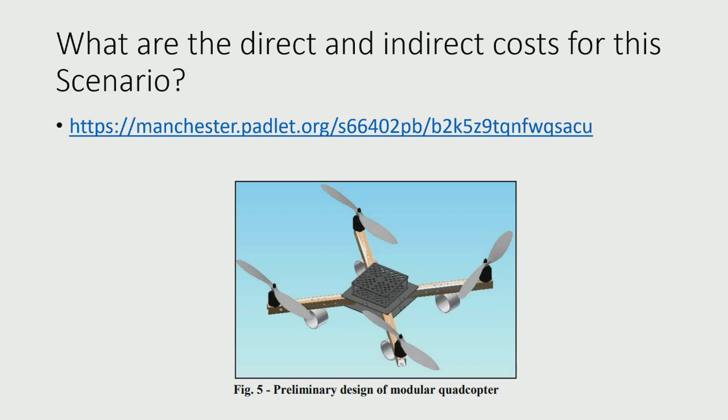So I mean, a lot of the time, sometimes with overhead, it's the accounting rules. So if you had a maintenance force in the university who went around mending things, then that would be an overhead. Although they would repair machines to keep your project going, you class that as overhead. To keep it simple, keep it to direct labour time and direct materials and consider everything else as overhead. So I can be a percentage time on the project, but something like catering is supporting the whole university. And there would be ways of trying to allocate that overhead, but it's still a supporting cost.